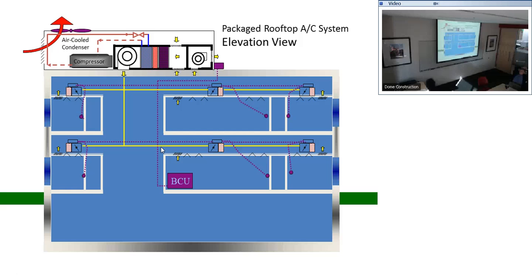Who provides the variable frequency drive? Who buys it? That is a good point. The electrician, the mechanical guys do this sometimes. Oh, yeah. No, never let that happen. Whatever Southland puts on their proposal. But when you work with such a good construction company as Dome, they have clearly identified the electrician and the mechanical sub-provider. We back it out of one or the other. You clearly told us ahead of time. David, usually we like to have the mechanical provided, the electrical wired.